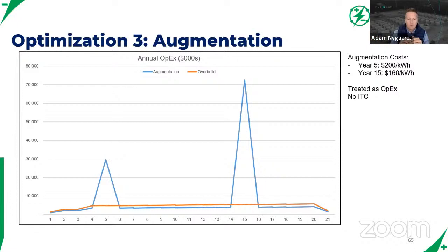The difference when you make changes to system designs and change those cash flows, that's how you will understand the impacts of those changes to the IRR. Because essentially IRR is just, at the end of the day, the cash flow to the investor across some period of time.